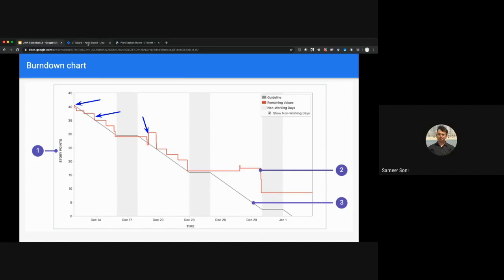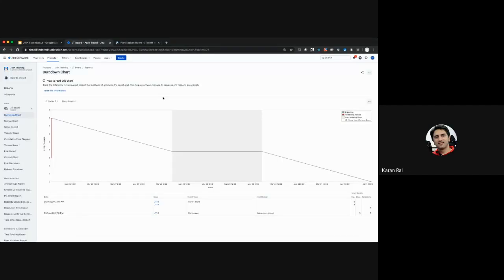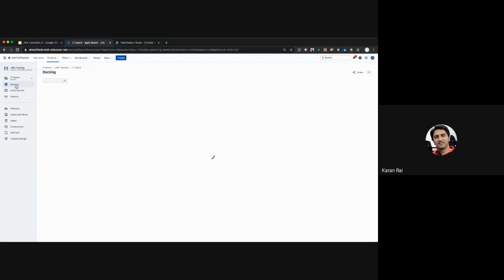Like a story was initially estimated, say, at 2, then revised to 4. Right. Or a new ticket with an estimation was added in the sprint, so the overall sprint got increased. Correct. It could be either a re-estimation or a new story from the backlog, which we decided to pull up because it was high priority.